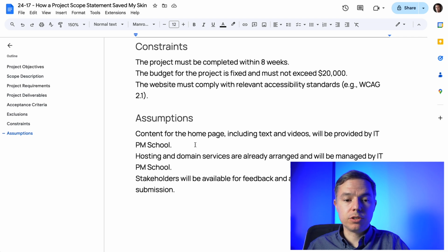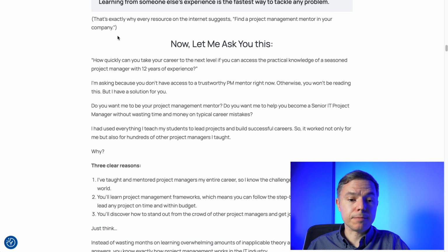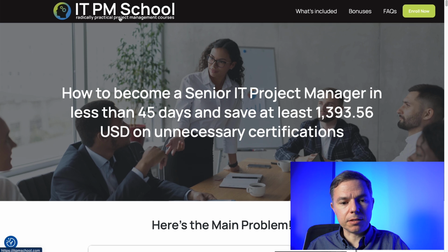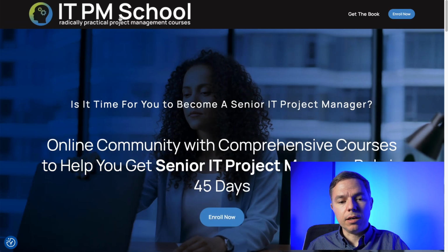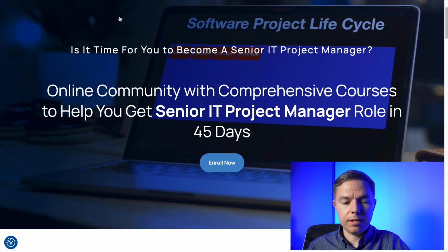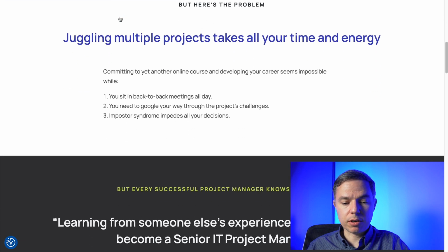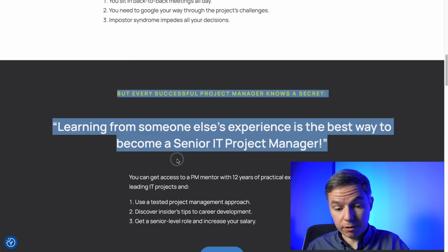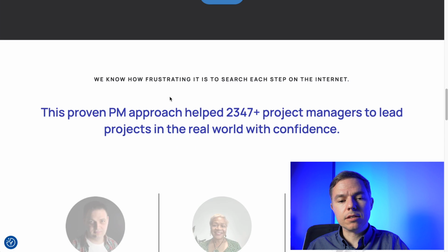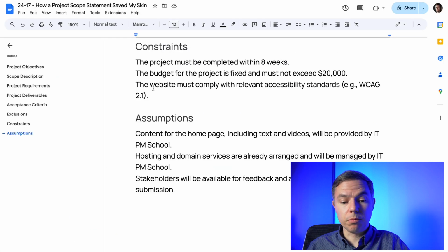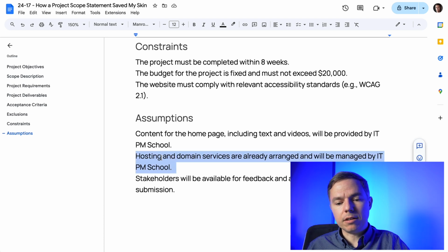So what it means is that we are technical experts, we are not marketing experts. We can put it all together in one website which will work correctly, but we don't know what to write or what should be in these videos, so we assume that you will provide us. That's our main assumption. If you don't provide this information, the project will be blocked, or it will not reach its project's objectives. Hosting and domain services are already arranged and will be managed by ITPM School.